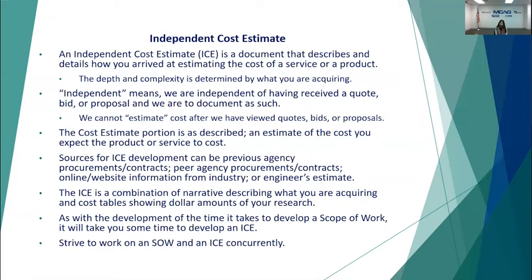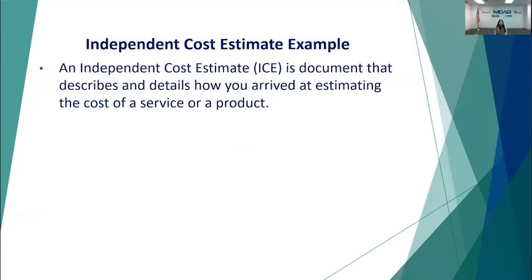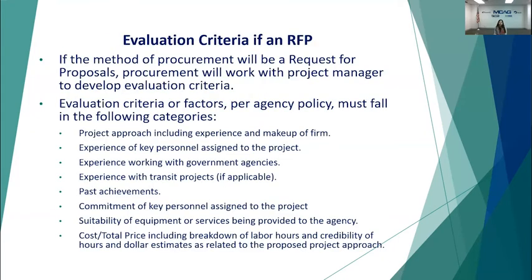As with the time it takes for you to develop a scope of work, it will also take you some time to develop an independent cost estimate. Ideally, you should be striving to work on a scope of work and ICE concurrently so that you can be processing and working towards these two documents at the same time. An independent cost estimate is a document that describes and details how you arrived at estimating the cost of a product or a service.